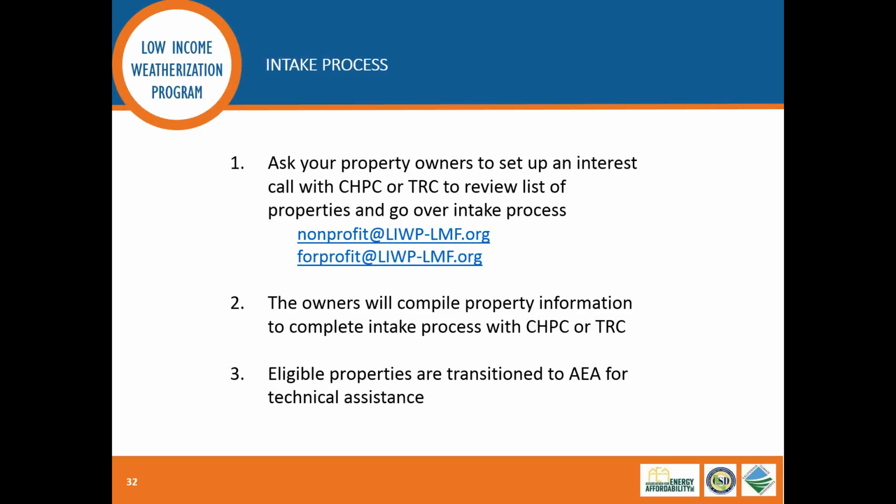If that ownership entity is a nonprofit organization, then have them email nonprofit@liwip-lmf.org, and that's going to have them go with CHPC, who's going to focus on the nonprofit properties. If your owner is a for-profit entity, they just email that email address there, and that's going to go through TRC. And they're basically going to do the intake qualifications, so make sure it's in a disadvantaged community, make sure that it's a low-income property, and then make sure that it really is a good candidate for the program overall, so that there are energy savings opportunities and that the project and the property has the resources, interest, and ability to undertake a comprehensive scope of work.